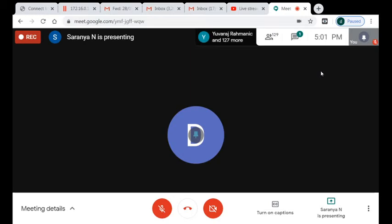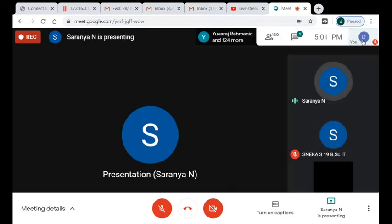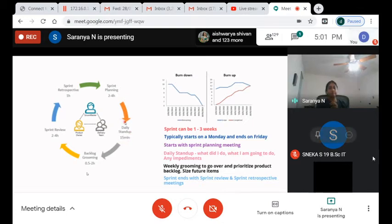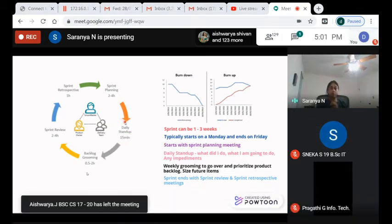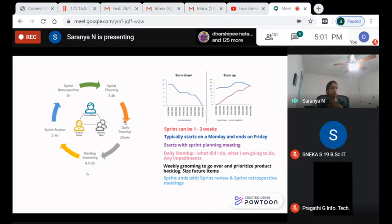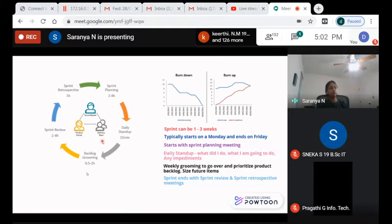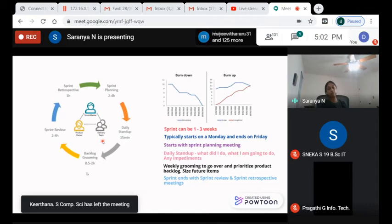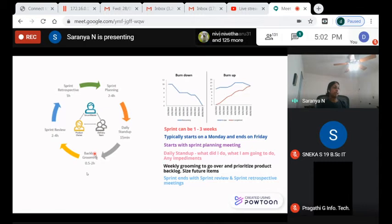In sprint planning we take a few product backlog items to work on. After that, every day we have a standup meeting — we talk about what we did yesterday, what we're working on today, and whether we have any blockers. We also have weekly backlog grooming sessions to focus on future user stories the product owner wants to deliver to customers.